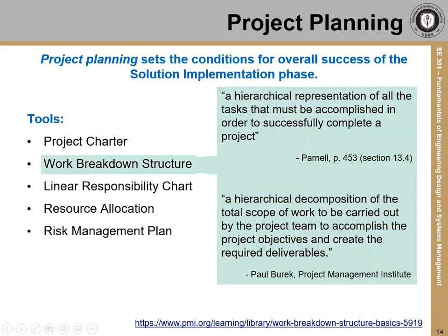The next tool that we'll discuss is the work breakdown structure, and you'll recall that one of today's objectives is that you need to be able to develop a work breakdown structure for a project. The purpose of the work breakdown structure is to know what needs to be done in order to complete the project. It is a depiction of the scope of work so that there is a common understanding between the project team and the stakeholders of what the outcomes or deliverables of the project will be. The WBS is shown as a hierarchy that decomposes the project.